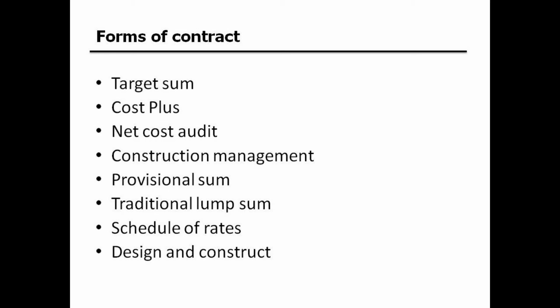Traditional lump sum, which is, I must say, my favourite. All the documents, drawings, specification, everything fully documented and detailed, all goes out to tender, is priced, and comes back again. There's an instrument for variations and cost control and program control on the project. Having said that, though, I must say one of the negatives with this form of contract delivery is its long lead time in design and tender.